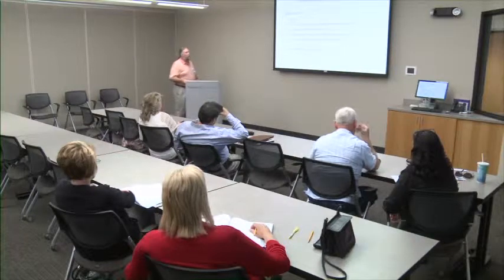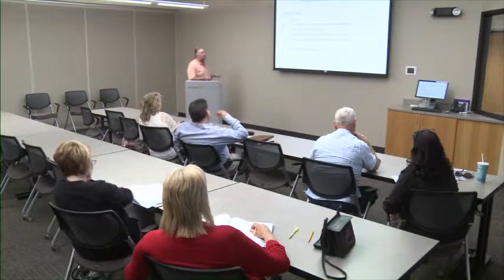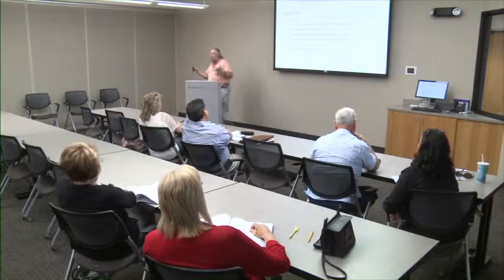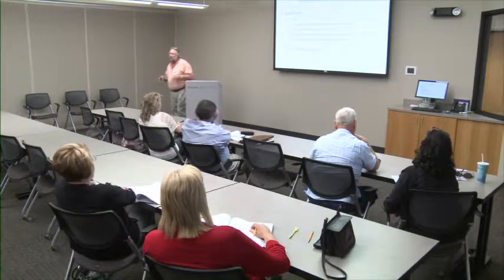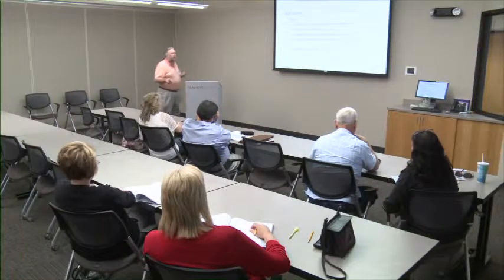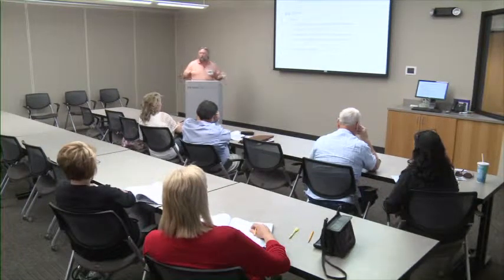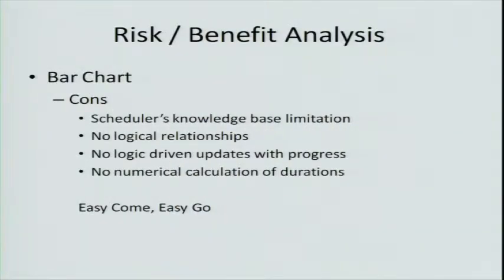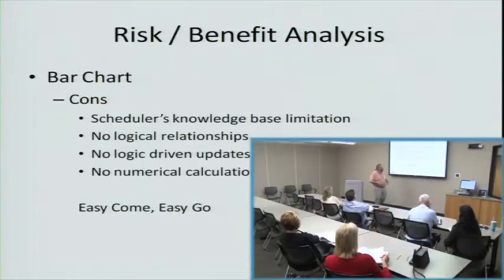Okay, some of the cons. Scheduler's knowledge base limitations. It's not as flexible as you think it is to do a bunch of things with. No logistic relationships. We don't see the interrelationship of one piece of the project to the other. We're not seeing how they're related. It's not logic driven, okay? So it's hard to update it with progress because it's just a task-oriented chart that says I have these tasks and I need to figure out what goes with which one.